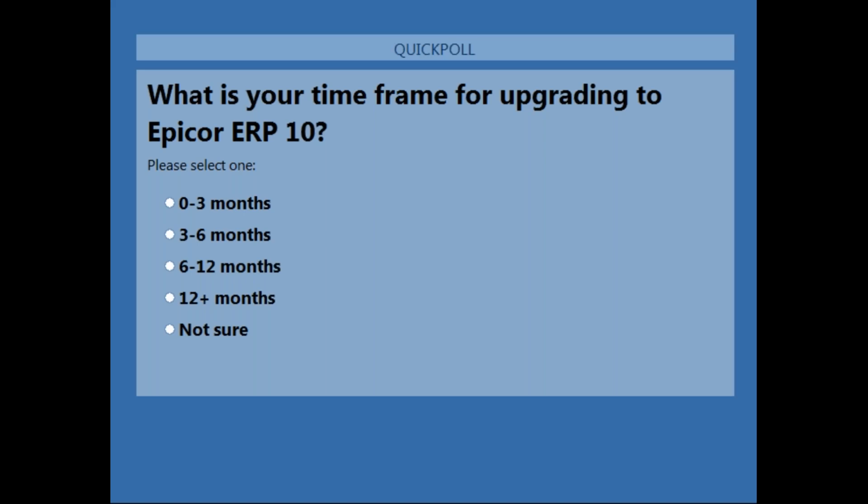Normally what I would allocate, for a medium amount of customizations and enhancements, I would recommend a project timeline that's 6 to 8 weeks. That's typically what we see. And that's going to allow enough time for processing and reprocessing the upgrades, customizations, enhancements, getting them done and tested properly, and also give your user community that 1 to 2 weeks of testing that they should do to validate the system.